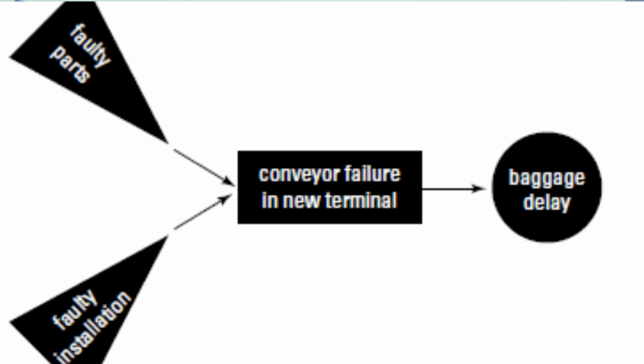So I'm going to take you through how you represent these three items. The triangle, for example, is what is used to represent a cause. A cause might be linked to one risk or multiple risks that can be triggered by that cause. Even the effect, it might be one or more effects. So this is very important for you to master as a project manager. It's not always one-to-one, but sometimes it is one-to-one. You have one cause, you have one event, you have one effect.